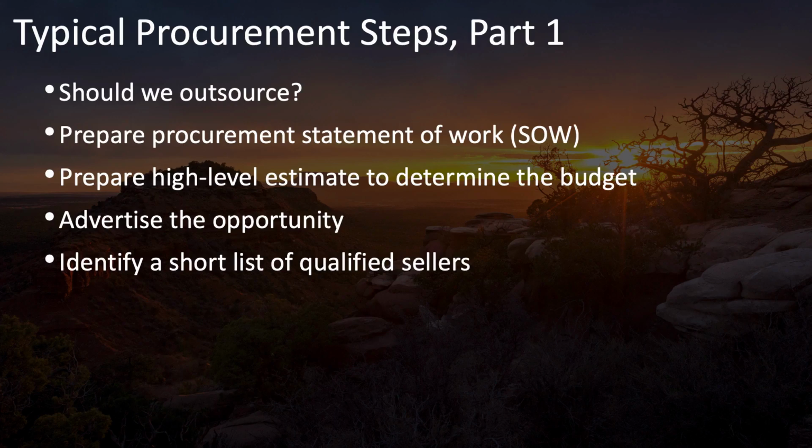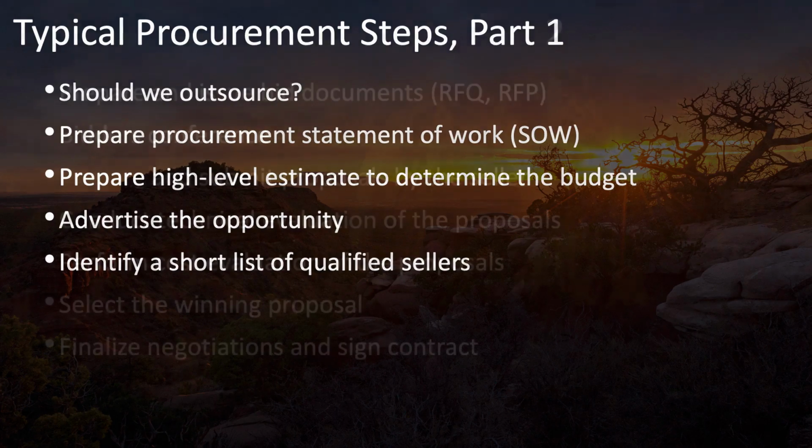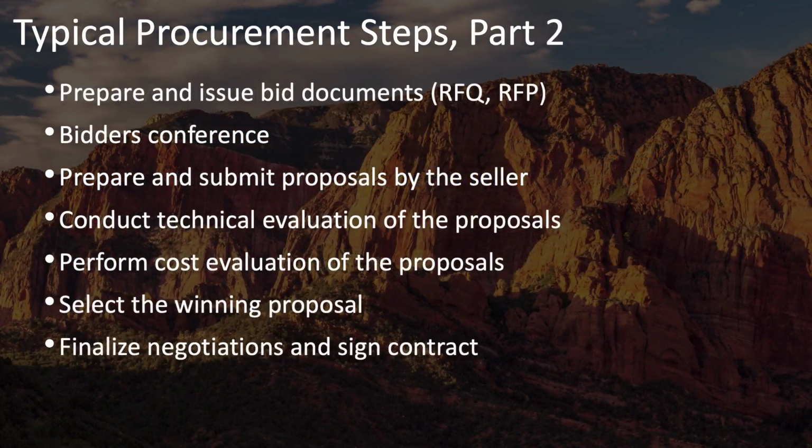You may, this is optional depending on your circumstances and your organization and its guidelines and rules, you may need to advertise this opportunity and identify a short list of qualified sellers before you proceed. Then you'll need to prepare and issue some bid documents, such as an RFI, RFQ, or RFP.